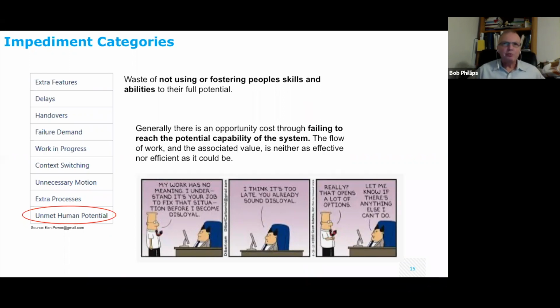That's where people get confused with the Agile principle, welcome changing requirements even late in the process. Basically what that means is you can change at the beginning of each sprint, but you can't change during a sprint. A lot of people will really confuse teams by saying, oh, we want this instead. Once a sprint starts, you're locked down until the team delivers it. The only exception is if the team is forced to work on a production defect, because production comes first, but otherwise no changes when the team is sprinting.